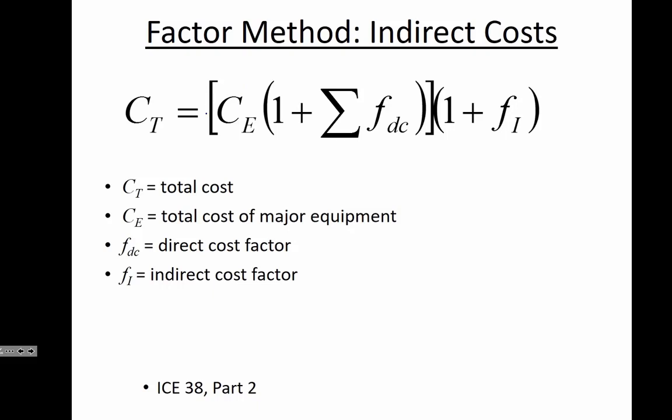In the case of the research project that I've told you about before, a big part of that expense was the drilling of the wells, but then there was also the part that we had to give to Marshall to support the physical facilities, the utility costs, the human resources people who are managing the hiring on the project, and so on, the benefits. There's a lot of indirect costs that have to be accounted for as well.